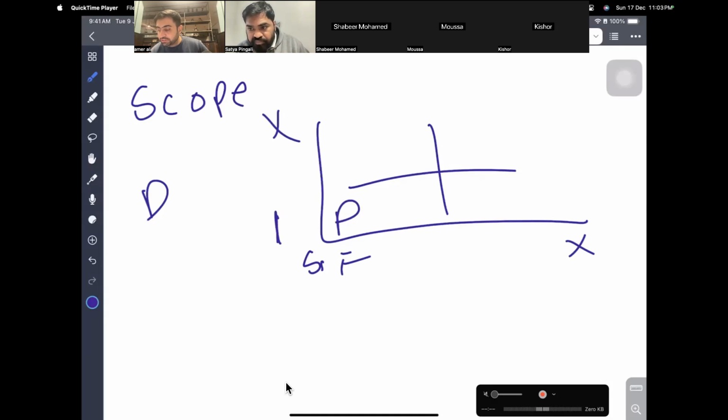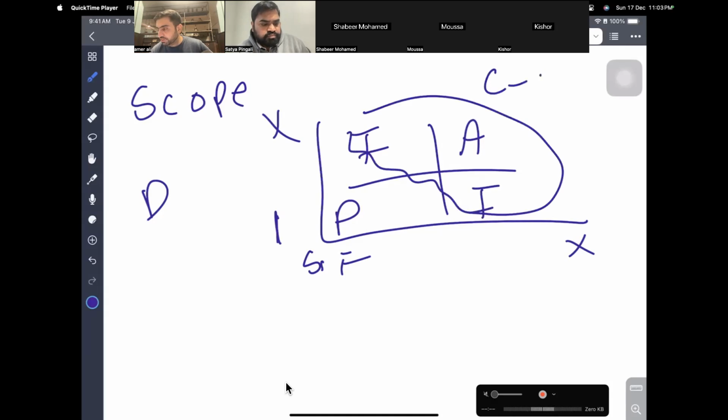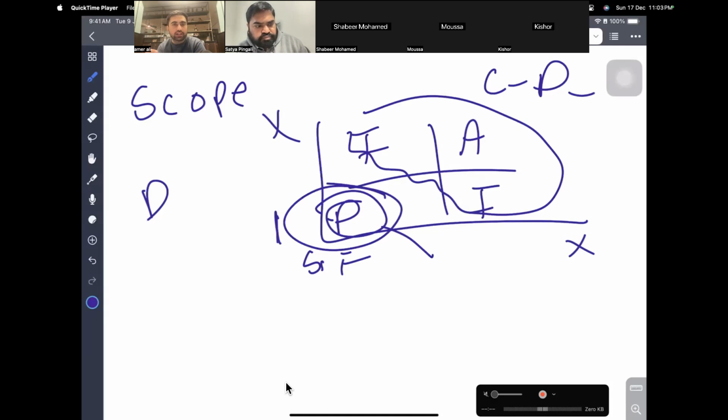If scope is fixed but we have multiple deliveries, it is incremental. If scope can change but we want one delivery, it is iterative. If both can change, it is agile. This is called change driven or adaptive. This is called plan driven or waterfall predictive. Let's first talk about predictive. How do we handle it if the project is predictive?